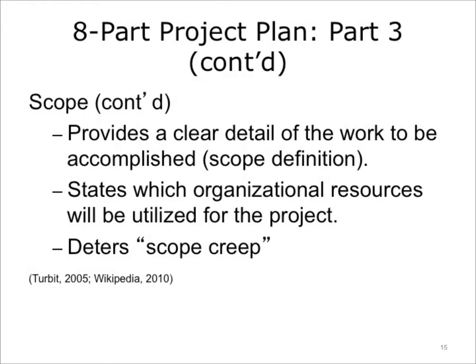The project scope should describe, from a quantitative perspective, what is to be accomplished. Defining the scope aids in establishing realistic work plans, budgets, schedules, and expectations. Should identified work arise that falls outside of the defined scope, it becomes the project manager's responsibility to determine whether the additional work falls out of the project's scope and should be deferred, or whether the scope of the project should be expanded to include the work. Expanding the project scope would mean making formal changes to the work plan, resource allocation, budget, and/or schedule.